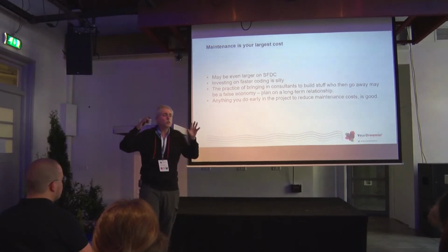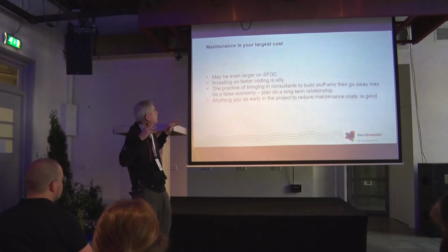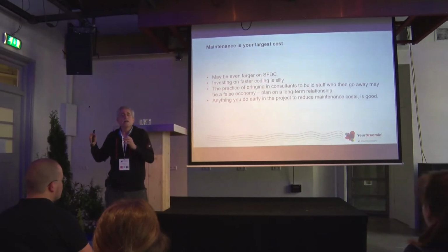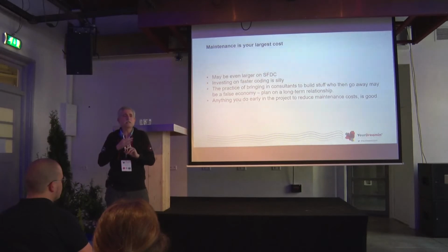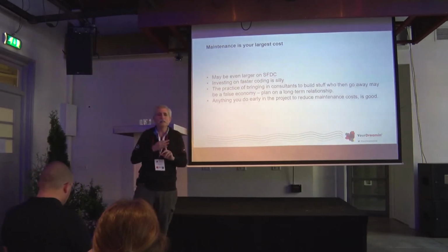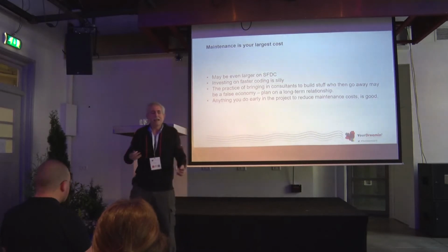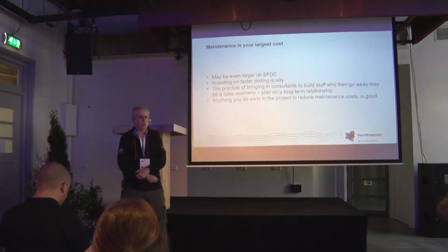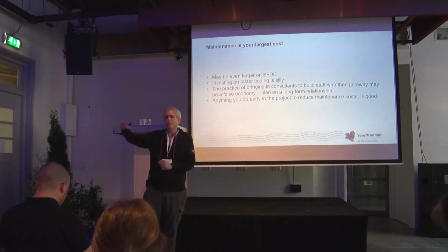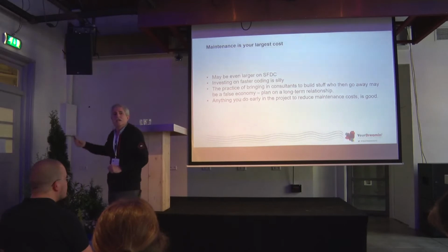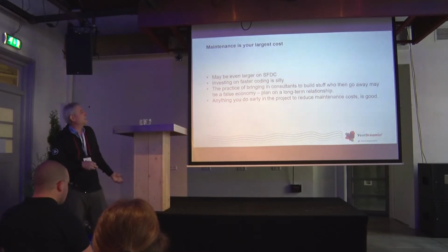Here's another thing. Anytime your company thinks of bringing in consultants to build stuff and they will go away, they don't go away. And it always takes longer than you think. Always. And I know this speaking as someone who's done consulting. And anytime someone says, yeah, it's going to be a 2-month project, I just book it 6 months, right? Because it always takes longer than you think, because you're always going to end up with maintenance.